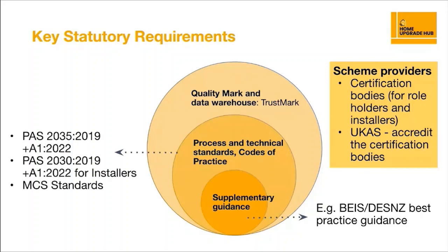So under the Home Upgrade Grant, all installers must be Trustmark registered businesses or equivalent and compliant with the corresponding regulations. And I think it's worth touching on subcontracting within that. So for example, you may find that local firms don't often hold Trustmark themselves. And in that case, they're quite often taken under a main contractor's registration. So you want to be confident that that main contractor is able to manage that subcontracting process properly.